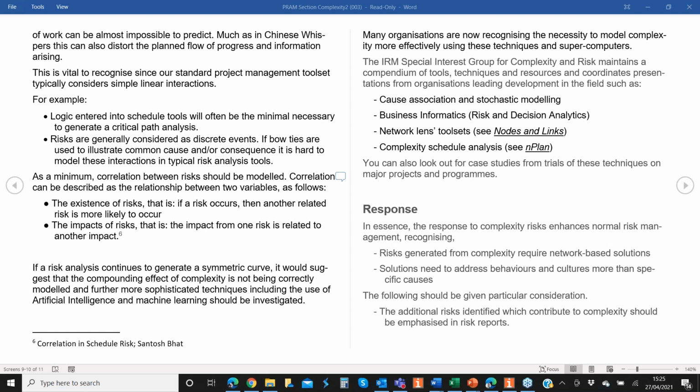Say that again, Rob. I wasn't quite sure I got that. One was availability of people. It says here things can spiral out of control, but it's just availability. I'll give you an example. Just getting the time for a monthly risk meeting, out of 10 people, 6 might not be able to make it, then 7, and you're just trying to get hold of people. So that was one, availability of people, a high level thing. And the other one was decision making. The process of decision making grows exponentially. I don't think that's mentioned.